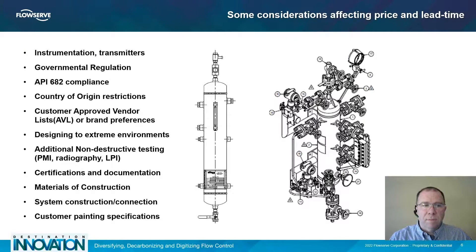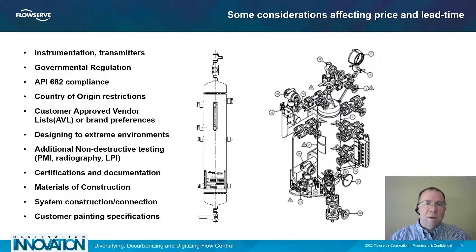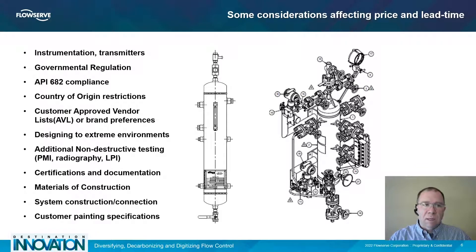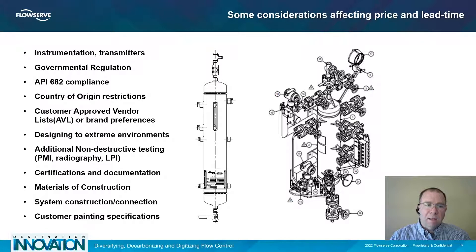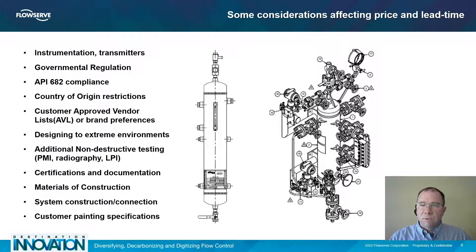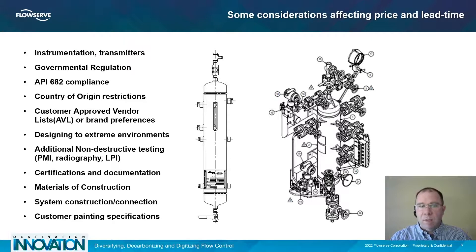As you start to specify your piping plan, it's very important to consider factors that can affect price and delivery. One of the most important is instrumentation. A general industry piping plan may have just a simple pressure gauge and level gauge that are inexpensive and readily available. But as your piping plan gets more complex and you move from switches to transmitters, the specific requirements of those transmitters may significantly affect the price and lead time.